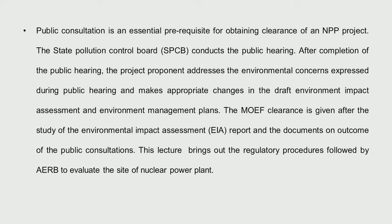After the hearing, the authorities look into the environmental concerns voiced. If they can make changes to satisfy concerns, they do so, and then go to the Ministry of Environment and Forests. The ministry also receives an Environmental Impact Assessment report carried out by an independent agency appointed by the nuclear authorities — normally consultants who independently do the job and submit the report. This lecture will cover the procedures followed in evaluation of a site for a nuclear power plant.